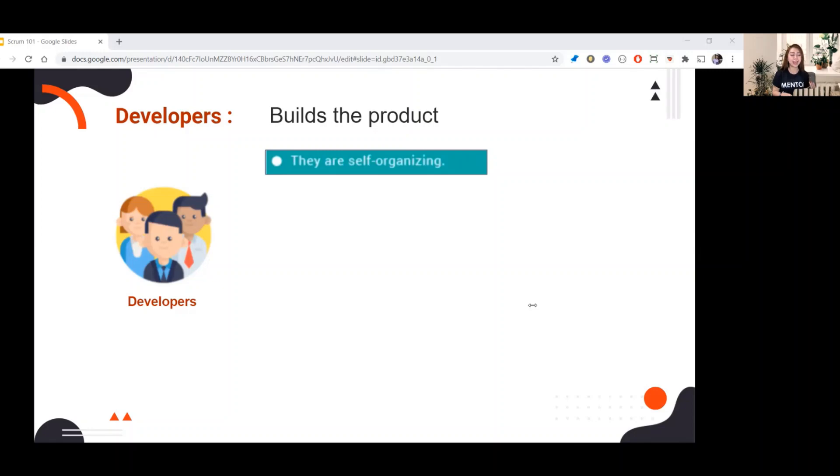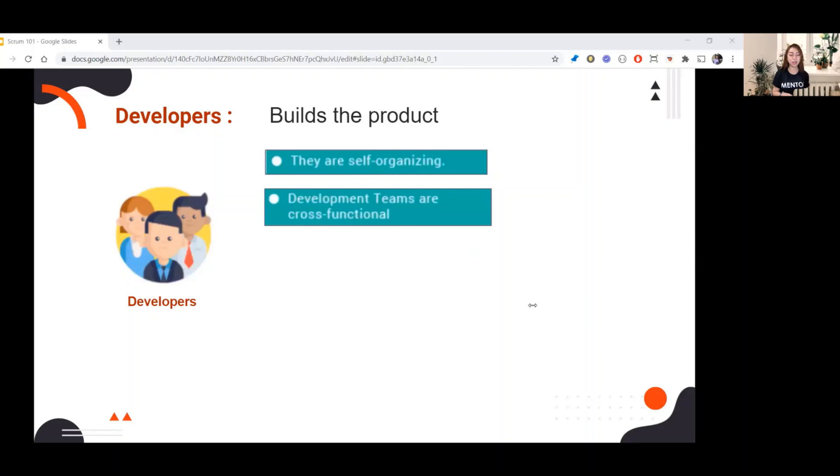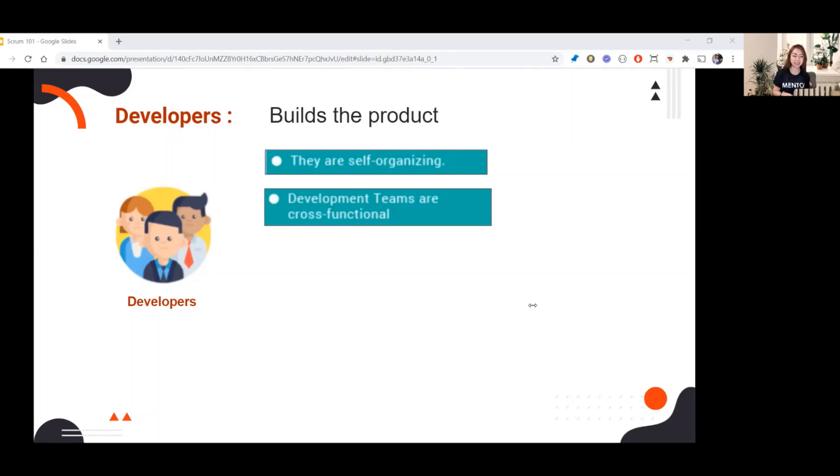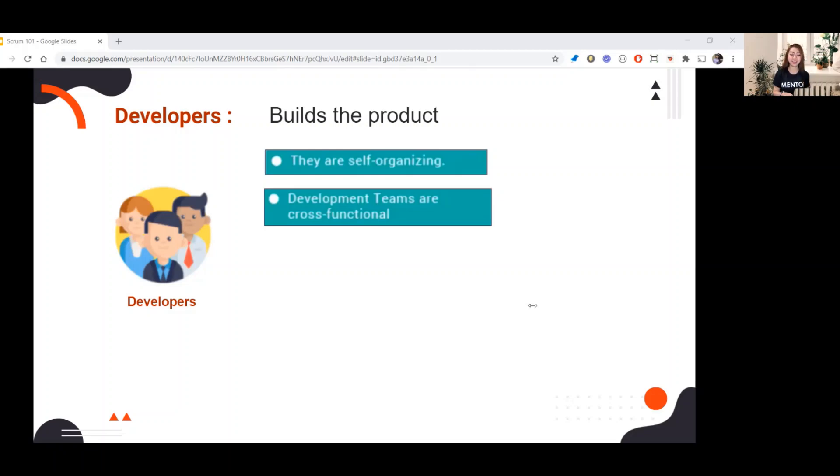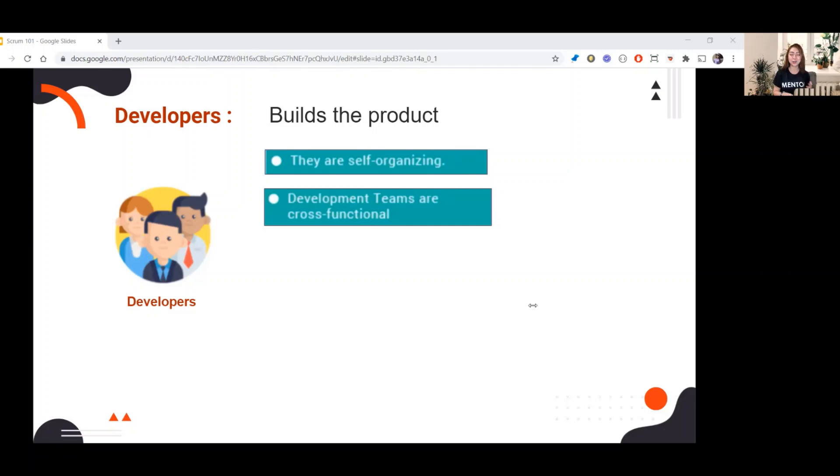Next, the development teams are cross-functional. Some people misinterpret this word. Cross-functional means that the team members have different skill sets necessary to turn product backlog items into a done increment. It does not mean that each member has all these skills. For example, there is a QA and that QA has all the skills of a front-end, back-end, iOS dev. That's not the definition of cross-functional.